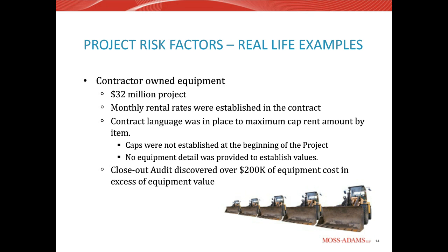It still can serve the functionality of what you need to do on your project. But when we're establishing the total reimbursement the contractor should get, they shouldn't get reimbursed as if it was a $100,000 brand new forklift. So really, the value should be established at the beginning of the project, when usually the general contractor is more willing to negotiate with you and more willing to work with you on these kind of items.